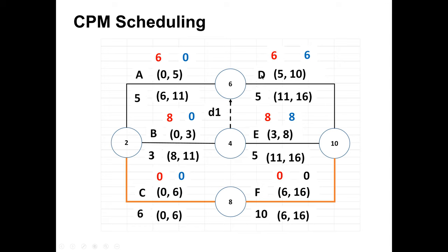The arrow shows which way the dummy is making the link, because the link for the dummy is for D. That D will start when A and B are complete. The predecessor activity for E is only B, but for D, the predecessor activities are A and B. Now these three activities D, E, F are going to finish at the same point, as there is no more activity.